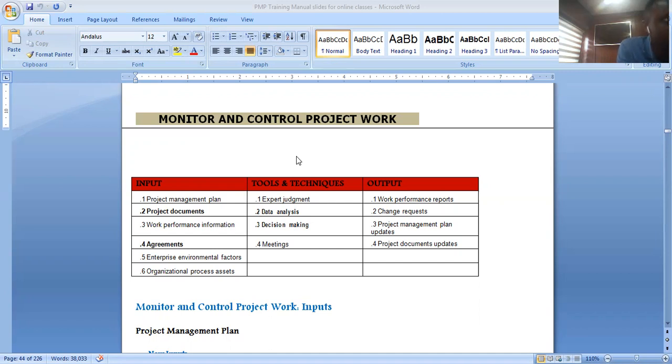If you are failing, what would you be doing? You're thinking of how to retract the project to be on budget, to be within scope, to be within schedule, to be within quality. Certain things may just somersault in, and they may want to push you out of the scope. You bring them back. So you're documenting places where you're saving time. You may have saved 3 hours, I've saved 3 days. We are 3 days ahead of the schedule given to the contractor. So we're doing well. Oh no, we are behind. What should we do now that we are behind? So this is what you're doing in this phase. You're monitoring and controlling it. You're looking at the agreement.